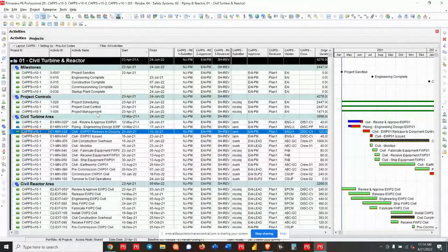So if you have the need to not just use one submitter, one approver, one reviewer, and you need to go into a bit more detail in terms of who's going to do the updates, that's okay too. So we can use activity codes in that example and get a little bit more detailed. So in this case, I'm saying I have different submitters. Even within one WBS, I have Ian that will submit, Sue, Nicole. So 3 different submitters here. Okay, so you can do that.